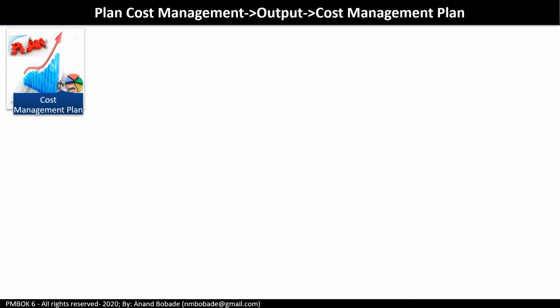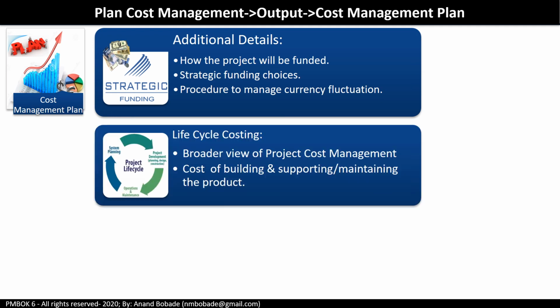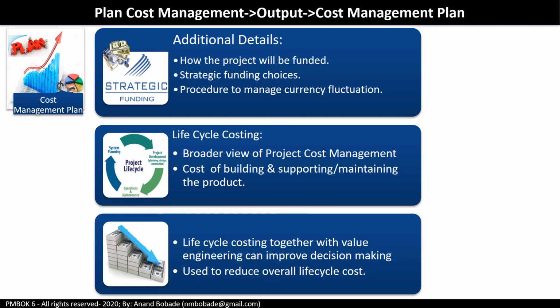Now we also have additional details like how the project will be funded, and strategic funding choices. We also have life cycle costing. Life cycle costing describes a broader view of project cost management. It considers the cost of using, maintaining and supporting the product, service or result of the project.